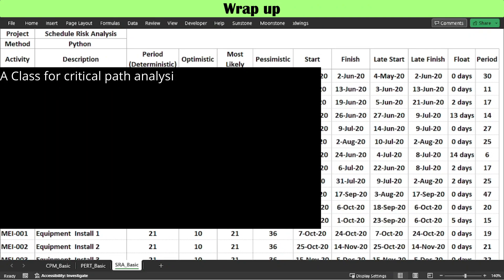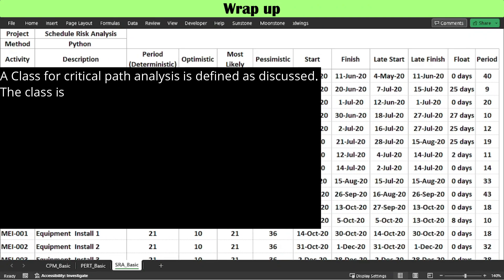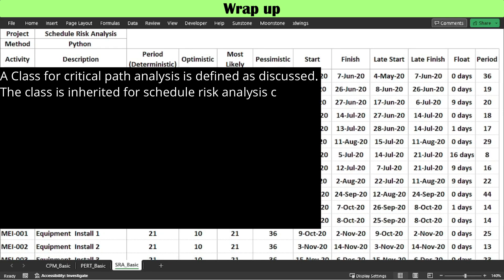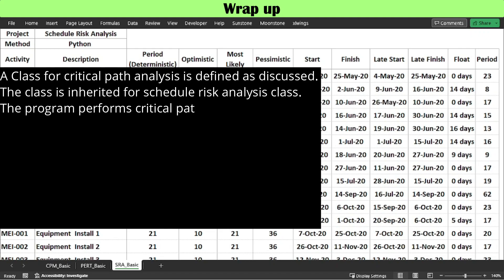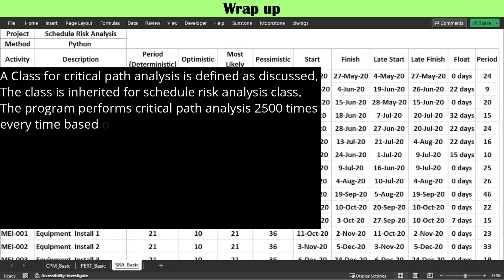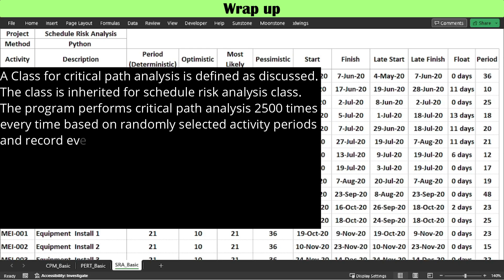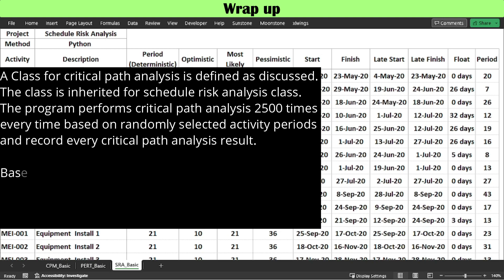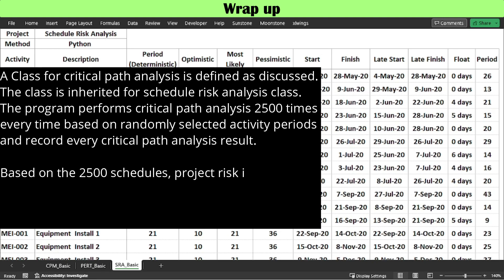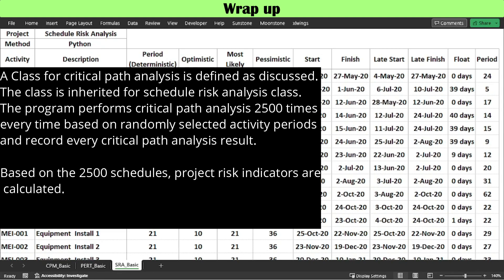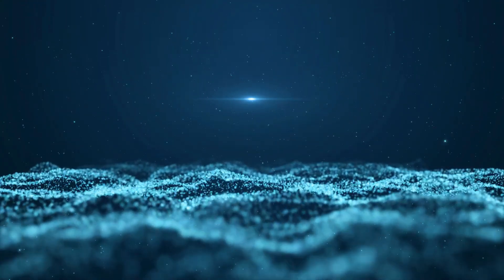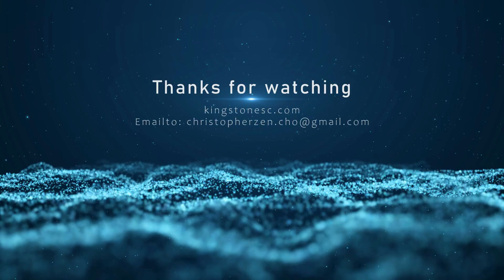A class for critical path analysis is defined as discussed and is inherited by the schedule risk analysis class. The program performs critical path analysis 2,500 times, each time based on randomly selected activity periods, recording every result. Based on the 2,500 schedules, project risk indicators are calculated. We have kept focus on process and associated coding structure rather than exhaustive coding details. You may offer your own better alternatives — welcome — or feel free to contact me to discuss specific coding details. Thanks for watching.